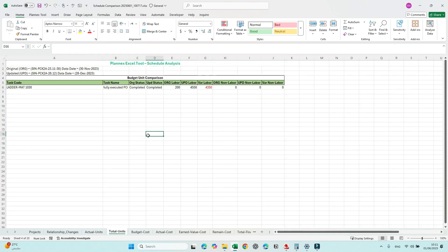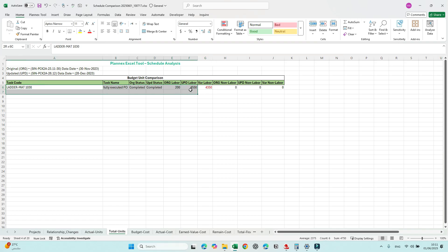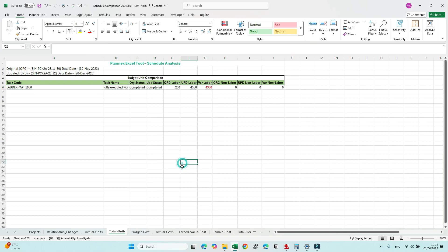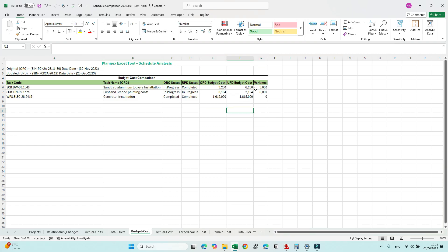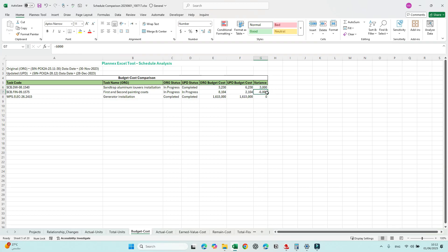Next is Total Units. We notice there is an increase in the total unit budget, which is not correct — we need to justify why there is an increase in the budget unit. Then Budget Cost: this should be zero, however there is a value here that has increased and another that has decreased.